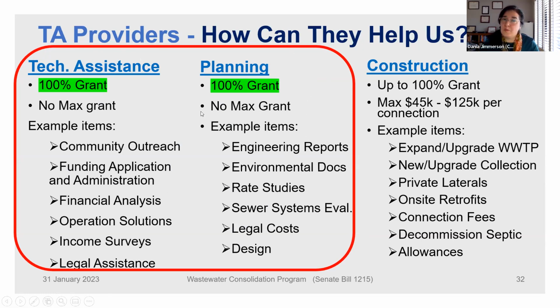And everybody familiar with these types of projects knows that the planning phase could take easily 2.5 years or more by the time you are done with all the preparation of the planning and engineering design components, and the FA is reviewed and completed, to the point of having a funding executable agreement. So having technical assistance providers is really an amazing advantage and a benefit that needs to be emphasized during these projects.